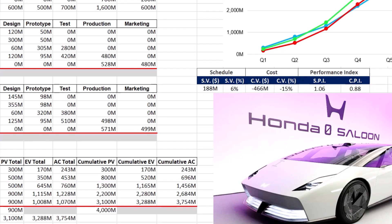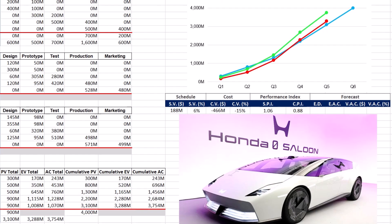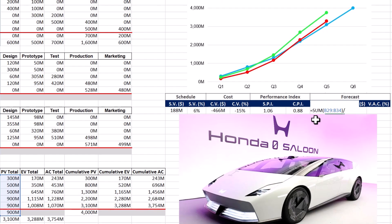Accurate forecasting of future project performance is also possible by using this proactive management method. Project estimate duration or ED predicts the total time of the project at completion based on current performance, helping project managers understand if the project is likely to stay within the original schedule. ED is calculated by dividing the planned duration of 6 quarters by the SPI. In the Honda Zero Series, the project is estimated to finish at 5.7 quarters, which is shorter than the initial plans. Estimated at completion or EAC predicts the total cost at completion and is calculated by dividing the sum of planned values over 6 quarters by the CPI — in the Honda Zero Series, EAC is $4,567 million, indicating cost overrun risks.